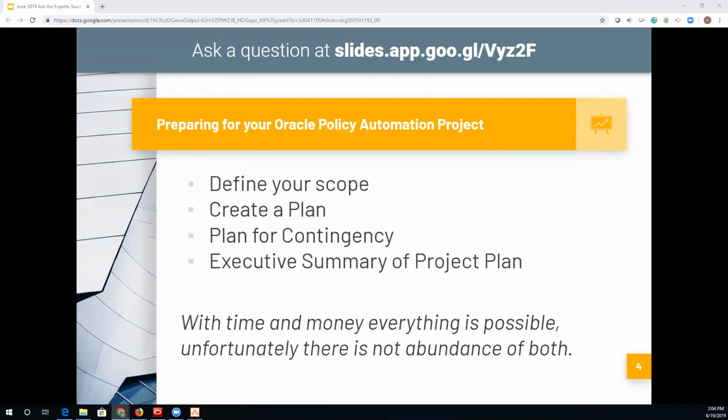Another great thing to keep in mind is that with a new tool, sometimes there may be a need for a process we call journey mapping, or what you may have heard is referred to as customer journey mapping. And this allows you to go through the process that your customer or your business unit may be exposed to from start to finish in order to explore all of the influence that the project might have on a group or a singular individual, and making sure to plan for that accordingly.